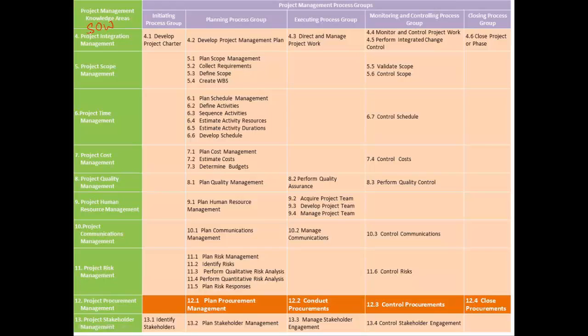No, project charter is different. Project charter gets created by the sponsor, but that's after a vendor has been selected. SOW is different. It's the statement of work, Naren, that comes as an integrated part of the contract. It describes the project deliverables.